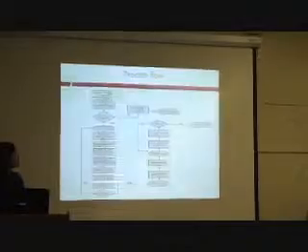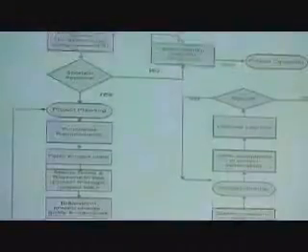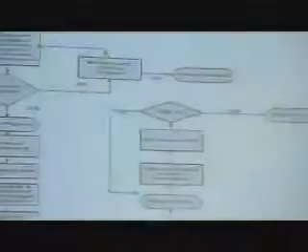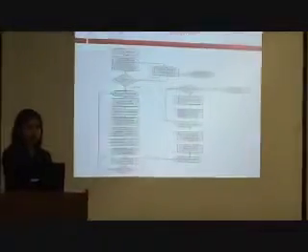Thank you. So for our project Moodle 2.0, this is the process flow that we all followed as a team. To start with, in the project initiation phase, the first step was the enhancements identification discussion with the sponsor, who's Dr. Rod in this case. Based on those discussions, we came up with a deliverable, which was the enhancement scope document. We went to the sponsor for approval of that document.